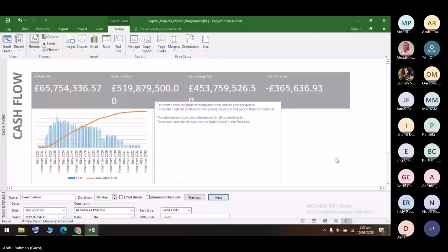They're directly proportional. Now the second thing that the S curve helps us in is resource allocation. When you see the S curve, if it's not coming as an S, you can see that we have to allocate more resources in the part in which there are more activities. What we do is assign more labor, more carpenters, more concrete layers, or more manpower to the particular activity which is lagging. So when we assign more resources, it actually makes the project ahead of schedule.